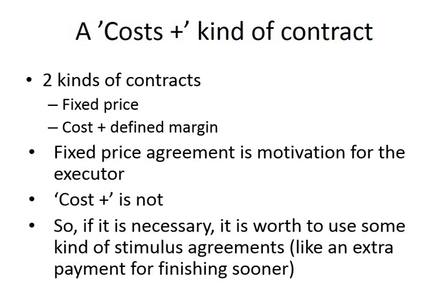So maybe you could think about some better solutions, like agreeing on a fixed price but promising something more if they do it better, they do it faster, and so on. This cost plus agreement can be dangerous. So we need to think about it.